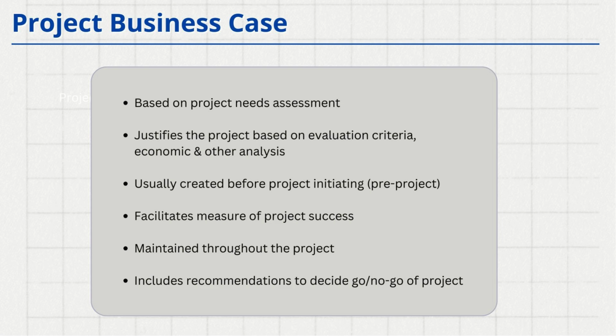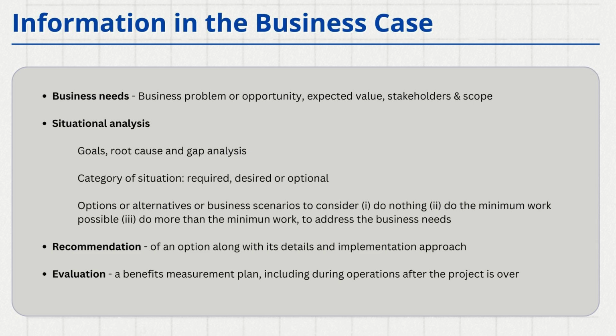A business case typically includes a need assessment, which we just referred to. There are various evaluation criteria. It would also have some pre-project work activities. Most importantly, it defines project success and how it will be measured. At the same time, it addresses how success can be maintained throughout the project. Of course, recommendations, go-no-go decisions, business needs, and problem areas are included. Why is this project necessary? What are some of the goals or root causes, and what are the recommendations?